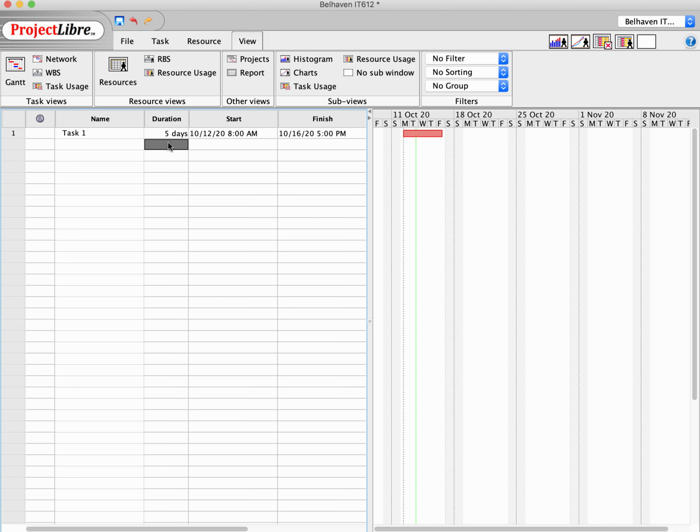That bar indicates the task and how long that task is going to take, and it shows up on our calendar. Of interest, by the way, just to whet your appetite, let's say this is 2 weeks long. It's now 10 days, and notice that it spanned a weekend. Okay, now the weekend, notice it's grayed out. If you look at October 17, at the end of the week, that's S for Saturday. October 18th, the start of a new week, that S is for Sunday, but those are non-working days. So notice that the project spans the full 2 weeks, because the default is, in this particular case, a 5-day work week.